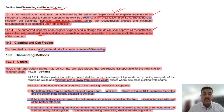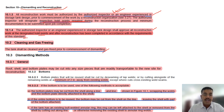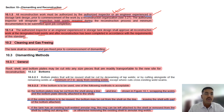The tanks will be cleaned and gas-freed prior to commencement of dismantling. Whenever you are going for dismantling, this is a safety aspect — you have to make it gas-freed and clean it properly. There may be some flammable or hazardous gas, so during dismantling if you do not remove those gases, a safety incident can happen.